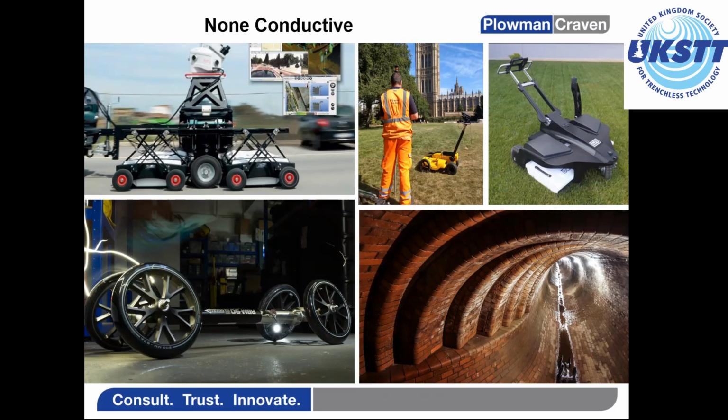Due to the speed this antenna can operate at, it reduces the need for significant traffic management and complex setups or permits. A support vehicle is required to protect the slow-moving vehicle and the expensive equipment, but with the correct signage in Chapter 8 and out of working hours, it allows the survey to be completed cheaper and more efficiently.